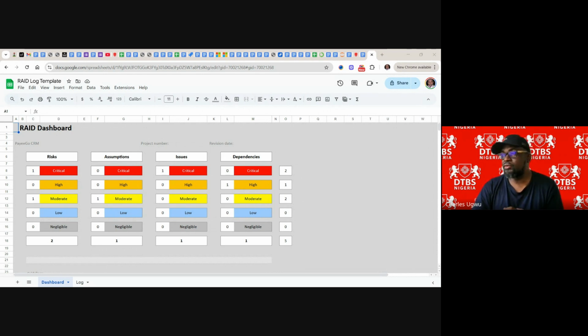In some cases, when a team realizes that they are lagging behind, a project manager can say, okay, a way to mitigate this is that we are going to be working weekends as well to push, or we can be working overtime. Those are ways to manage such things. Overtime, weekends, and you push, and you find that you get your project where it's supposed to be.